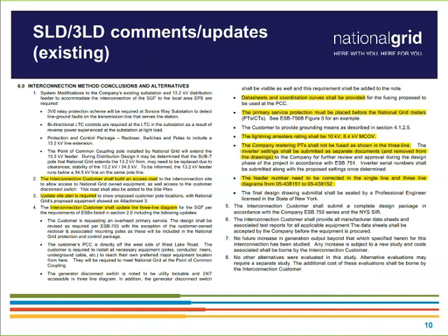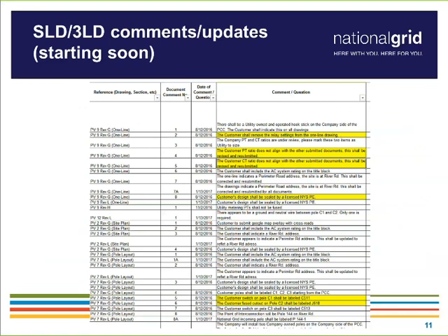And moving forward with the overhaul of the CESIR final study template that the joint utilities are working on, we're pulling out those specific comments that pertain to mostly the constructability or physical requirements of the drawing package submitted, and we're including them in this Excel format that's more like an action items type list that National Grid has typically provided post-study on most of our projects anyway.